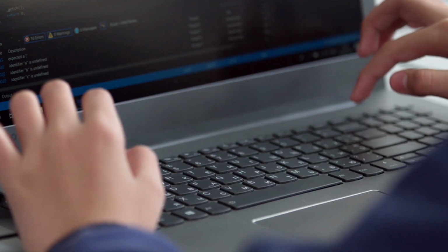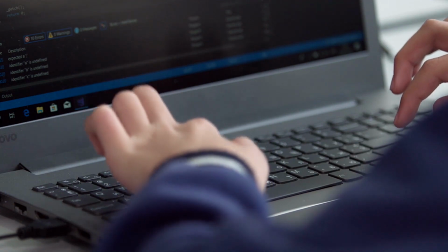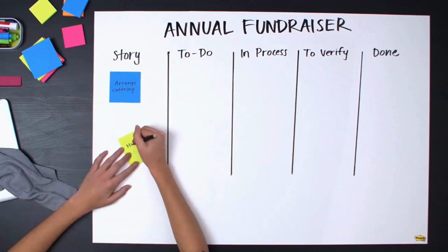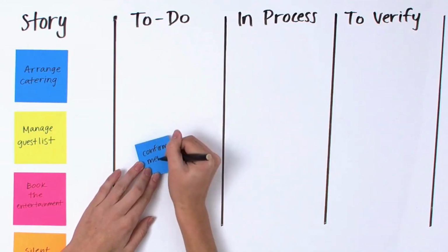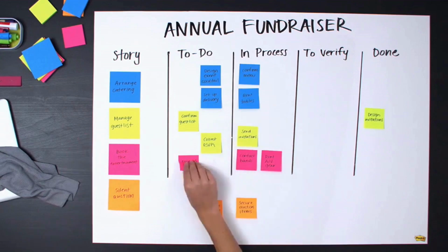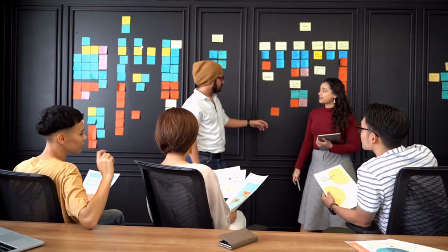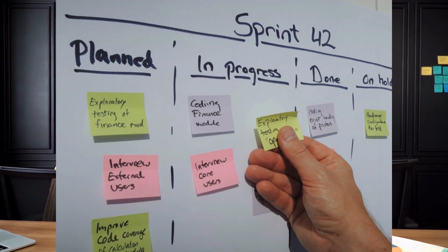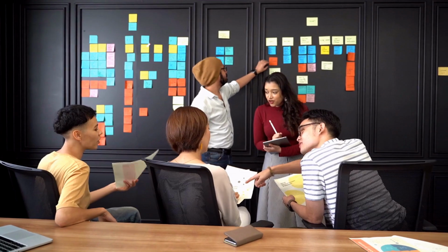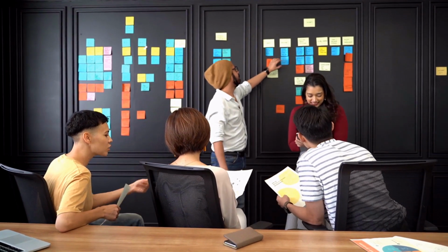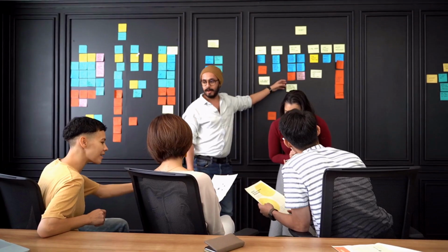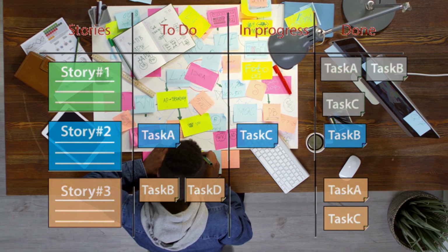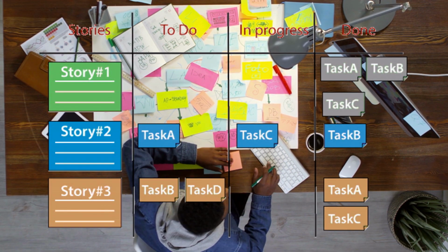As part of the sprint, the task changes its status. And this is one of the most important concepts of the sprint, the status of the task and the time of its sprint life cycle. Initially, tasks after evaluation fall into the to-do status. We have a board in Scrum, regular or electronic, with columns where tasks move by status. Columns can be named differently. For example, we have to-do, in progress, code review, ready for QA testing, QA passed, done columns. But the boards are different and the columns can be more or less.